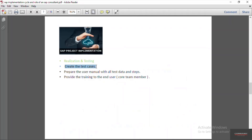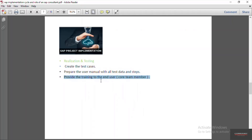The functional consultant also creates test cases and prepares the user manual. According to the user manual, the core team members complete their training. The functional consultant arranges a training program for all core team members of each module like FI, SD, and MM, because every ERP software has different processes and core team members require detailed knowledge about them. This — configuration, testing, training, and documentation — is all done in the realization and testing phase.